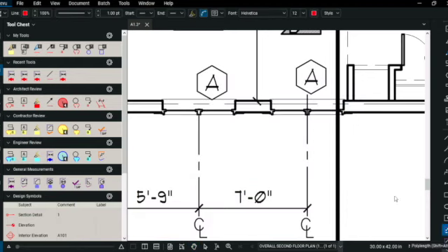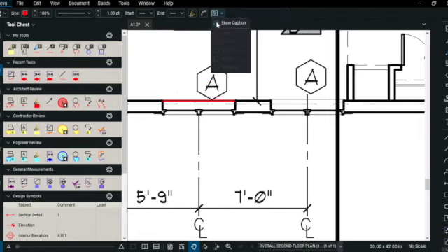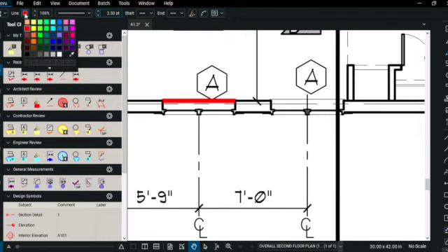To map out our window, select Polyline and then select the two edges of the window in order to get the full measurement. Once selecting Enter, you can edit multiple properties of this tab shown. You can remove the captions, you can edit the line thickness, you can edit the color of the line, and even the opacity of the line.